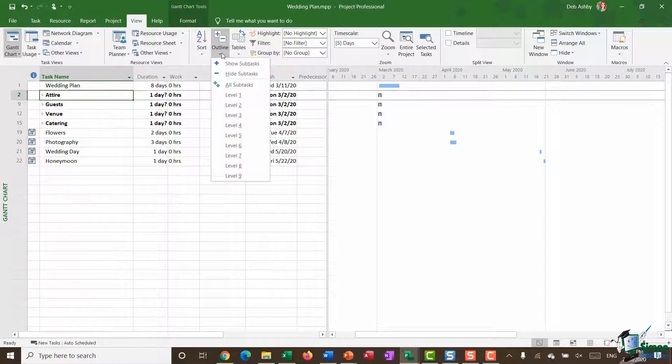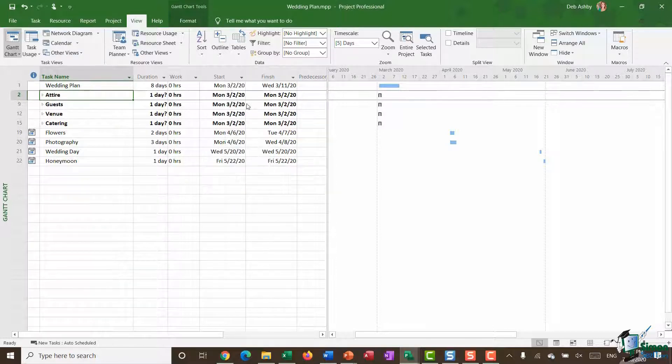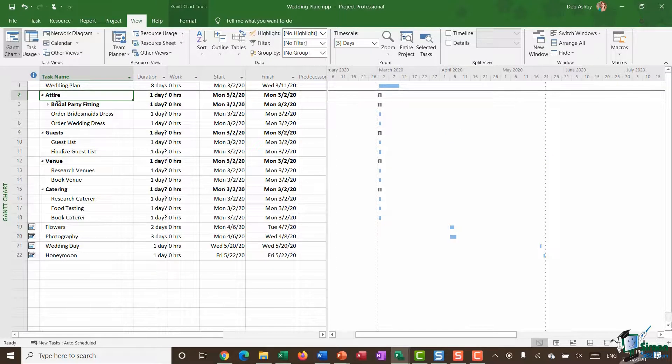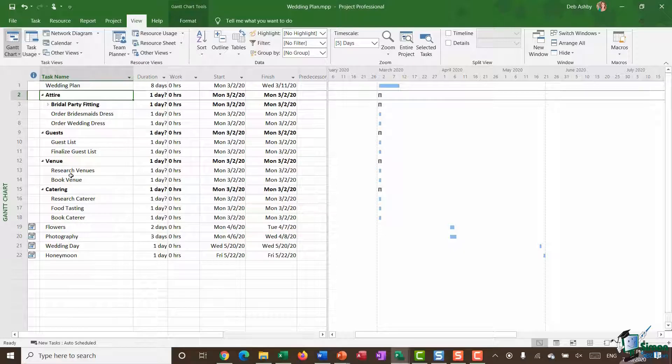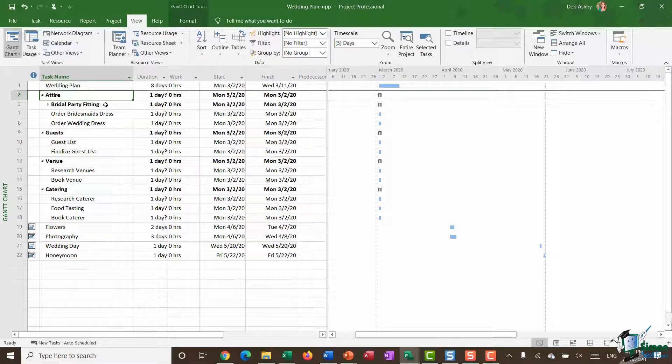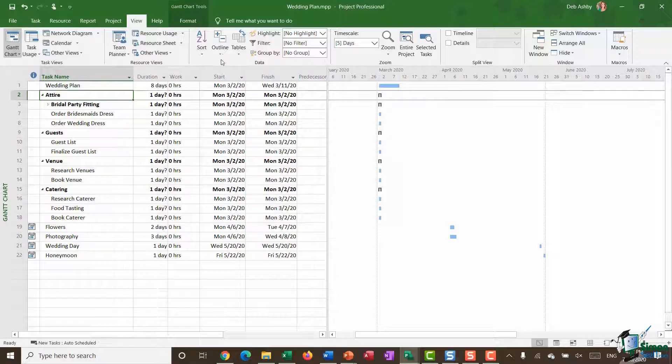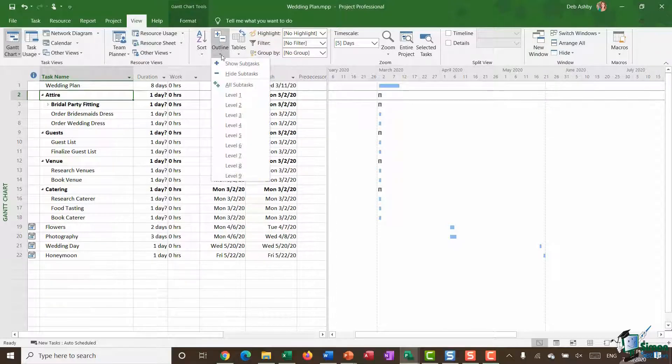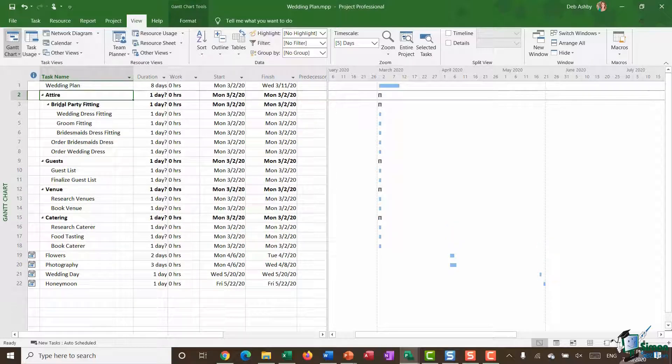If I want to bring those subtasks back I could say level two and it's going to bring those back but notice that it hasn't expanded bridal party fitting because everything under there is a level three. If I wanted to see those I could go back to outline and say level three and you can now see I can see those tasks.